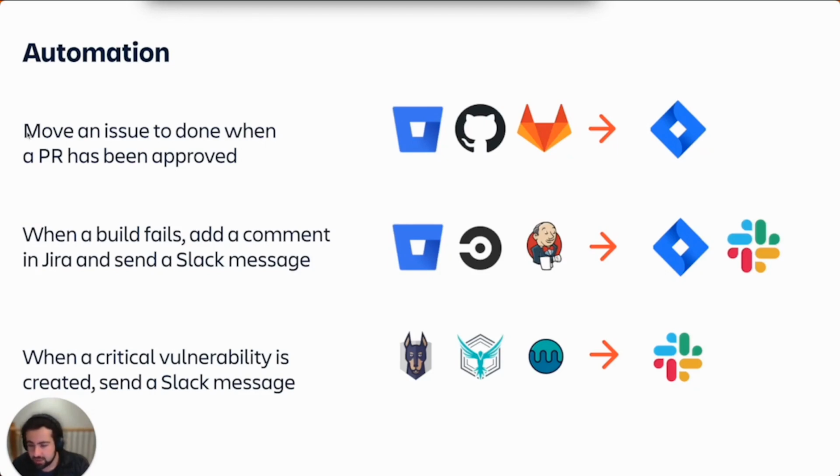It depends how your team works and what your workflow is, but you could even use a different automation that says, when my issue is deployed to production using my CI/CD integration, then move it to done. And so if you've got these automations set up and they're in sync with where the work is at, your reporting is all going to be standardized across all the different teams that use it. And what I really love about that is that when you want to rely on things like DORA metrics, you can trust that users haven't just forgotten to update their issue status. And you can build really powerful insights to help your team get better and improve.